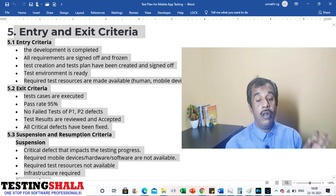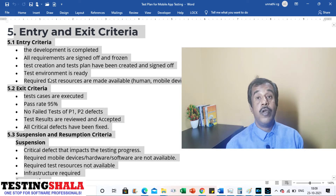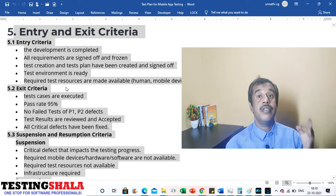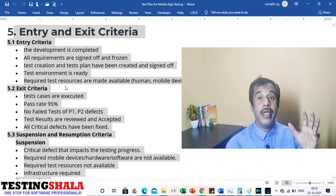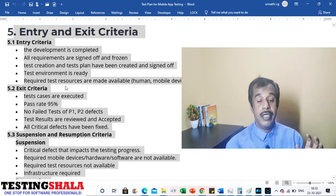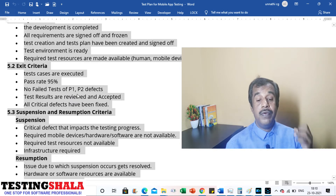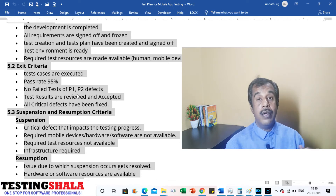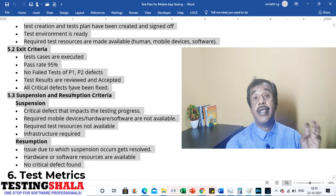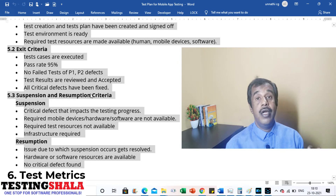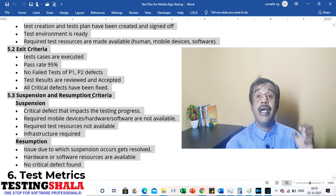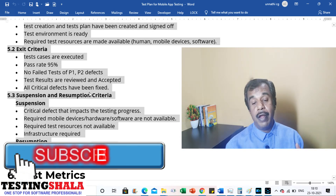We should also document entry and exit criteria. Entry criteria for system testing: all development is completed, requirements are signed off and frozen, test cases and test plan are created and signed off, test environment is ready, and required resources — human, mobile devices, and software — are available. Exit criteria: all planned test cases are executed, pass rate is 95%, no major or critical defects are open, test results are reviewed and accepted, and all critical defects are fixed or deferred to the next release.